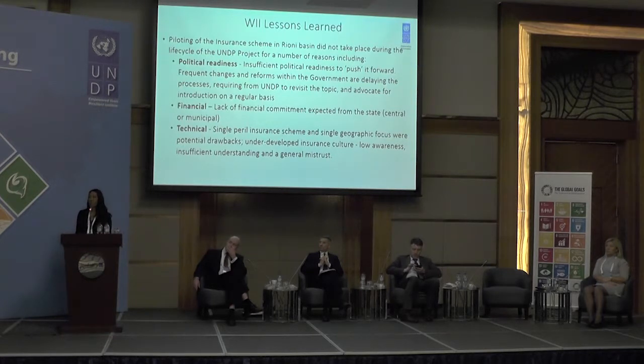So in the first place, the political readiness wasn't there to push this forward. So we'd taken it this far, and we needed government to take it on and start making the relevant decisions on it. This was likely because of frequent changes and reforms with the government. It delayed the process, and UNDP is advocating on a constant basis to have this revisited. The financial commitment that was going to be required for most of the scenarios presented was seen as potentially a barrier for government wanting to take this on.